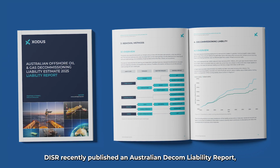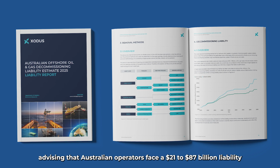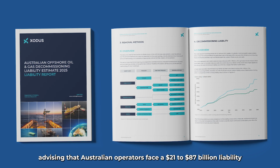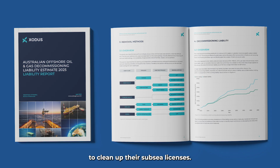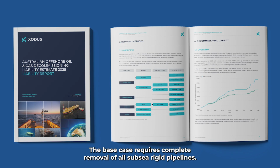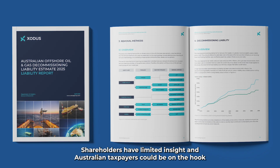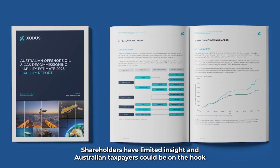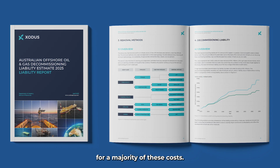DISR recently published an Australian decom liability report, advising that Australian operators face a $21 to $87 billion liability to clean up their subsea licences. The base case requires complete removal of all subsea rigid pipelines. Shareholders have limited insight, and Australian taxpayers could be on the hook for a majority of these costs.